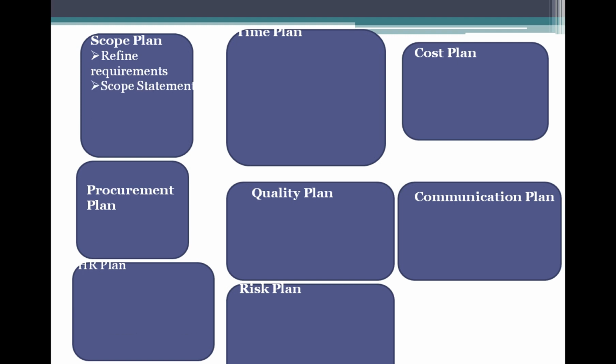Once he gathers all the requirements, he has a series of meetings with the sponsor to decide what to include and what not to include in the scope statement. All requirements in line with the project document and with the project objectives and high level requirements stated in the project charter will be placed in the scope statement.